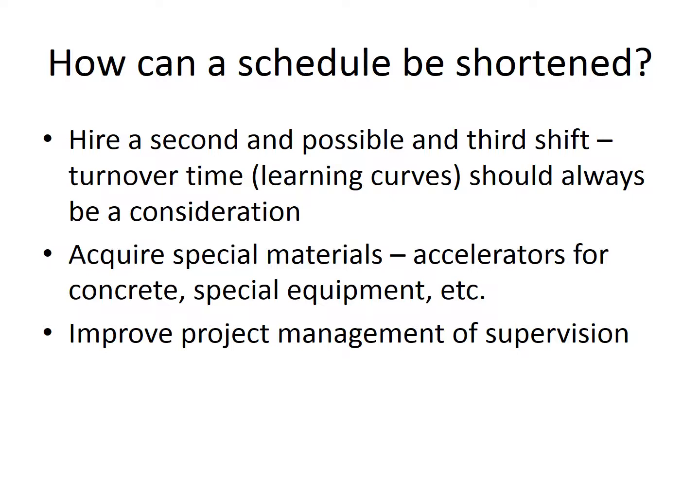Things get done efficiently when I have the right tool for the right job. So equipment selection is of paramount importance in efficiency. Most specialty subs will have a good handle on what works best for them, but I can tell you, for example, cutting certain materials that you might not have dealt with before, stainless steel, for example, obviously requires special cutting equipment. So there are things that do require consideration with respect to schedule and even just the basic power tools I might be using.